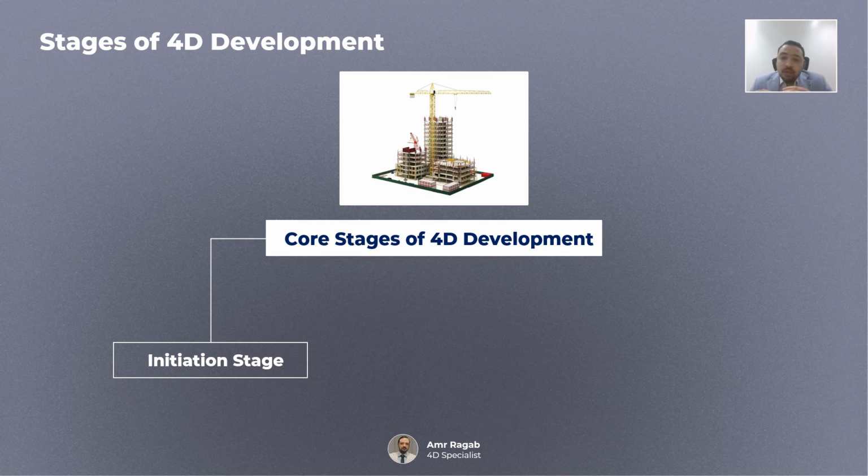Also, in design models, they model the wall in multiple layers, but when assigning the process, you will assign each layer to a separate task. As an example, plastering work and painting work are, in the design model, all in one element.